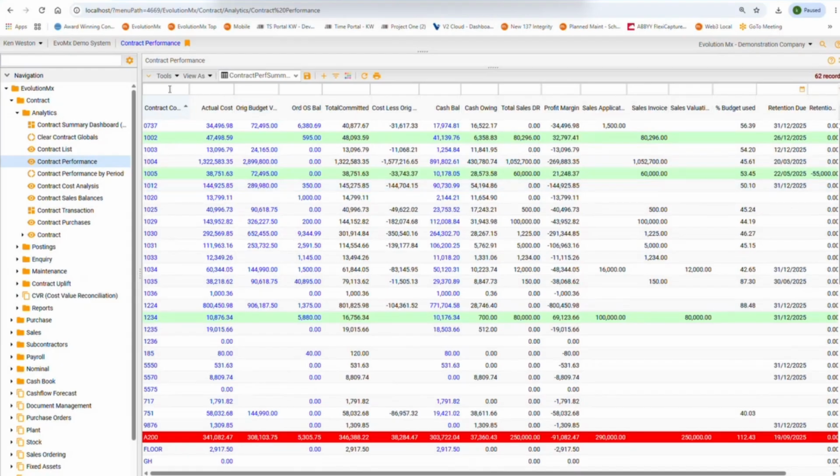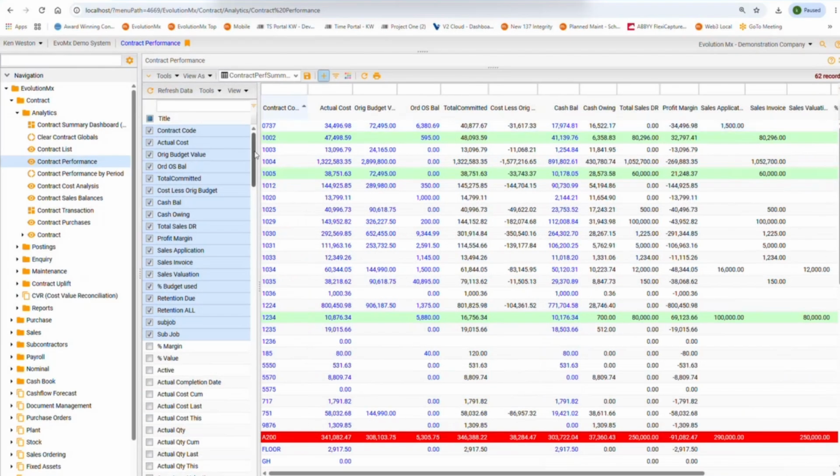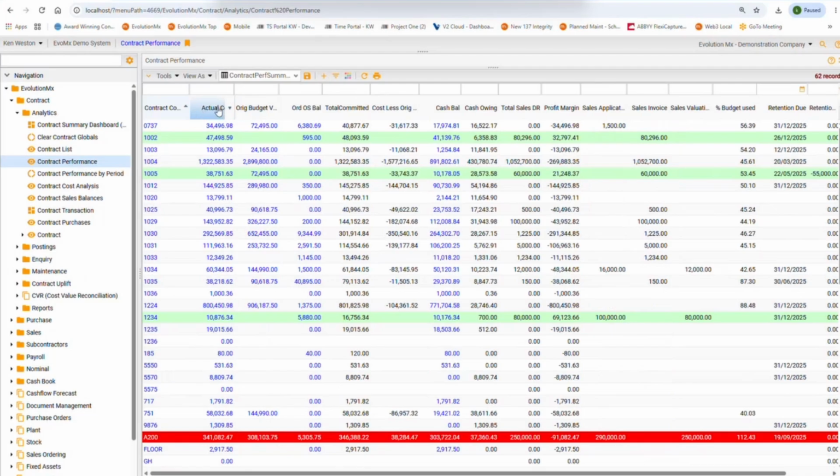The information that's included on the report can be at your decision as well. So you've got the option here to choose fields to be able to say exactly what you want to have on this particular report. Now I've chosen for there to be a sum cost per individual job, alongside which I've got budget values. Now those budget values can either be manually entered into the system, or more likely you can use an import tool, and that can import budgets in a summary or detailed version, whether they sit in Excel or whether they've been exported from any of the leading estimating systems.